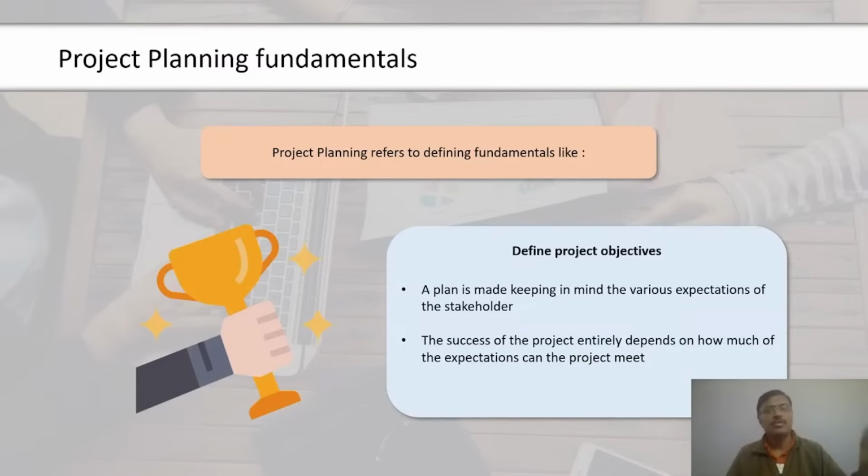In the third step, we will add the duration to the bar graph. We will right click on the chart and in the menu that appears, we will select the Data option. A window appears on the screen. In that window, we will select the Add option as shown. We can also see the start date is already in the entry section. Then in the dialog box that appears, type tenure in the series name and click on the range selection icon that's shown in the figure. Now select the relevant data from the tenure column and click on OK. Now we can see a bar graph that has 2 colors on the screen. This bar graph now has the duration of the tasks.